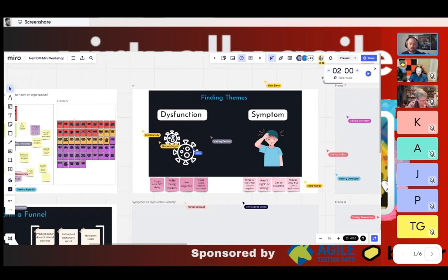So that gives us our first way of trying to go after the most impactful things. Just to simplify that down, when we talk about dysfunctions, you can see some little red stickies down here that summarize. Dysfunctions are often going to be things that we're not doing. So if we're not setting a sprint goal or we're not limiting work in progress, that would be a dysfunction. Often a way to think about that is anytime that we're breaking the rules. If we're a Scrum team and we break the rules of Scrum, that would be a dysfunction. That means these things can become objective statements. It's an objective reality that we are not setting a sprint goal. Whether we should or shouldn't is potentially open to debate. But if it's causing negative outcomes that we can observe, well, then that gives us a really good idea that it's the right thing to go after. So that's just something to keep in mind.